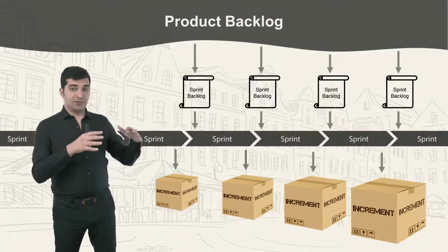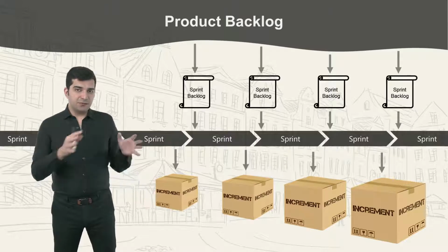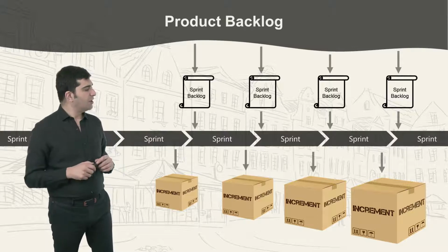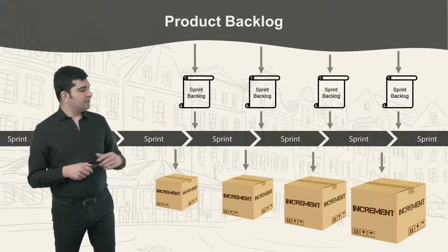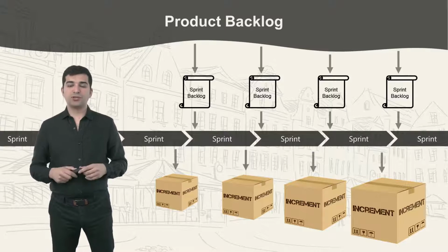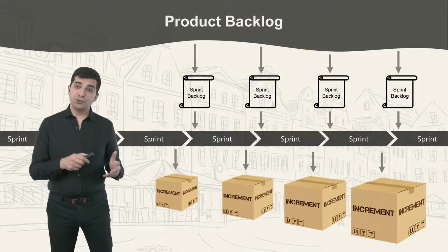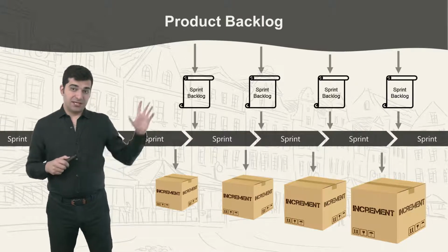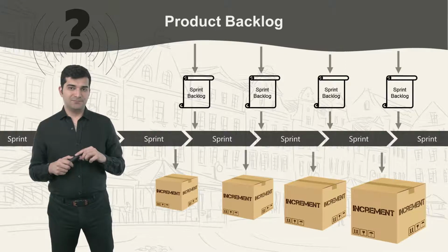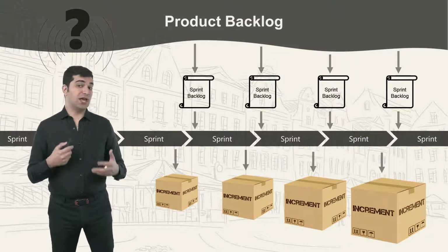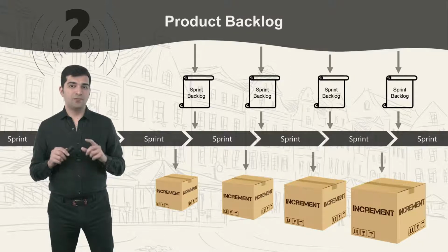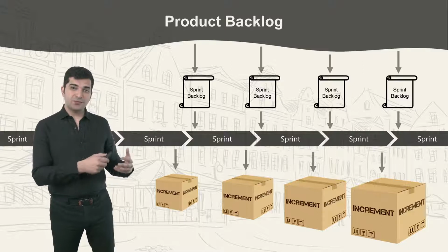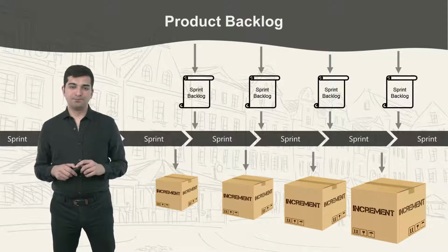Instead of looking at a big product backlog, we will have a small list, and that's our plan for the sprint. So we work, and at the end of each sprint, we will have a piece of working software. We will show it to the customer, we receive feedback, and where is that feedback reflected in this system? The ideas that are generated, the changes that they may want. Those will be reflected in the product backlog. And then we will use the product backlog for the next sprints.